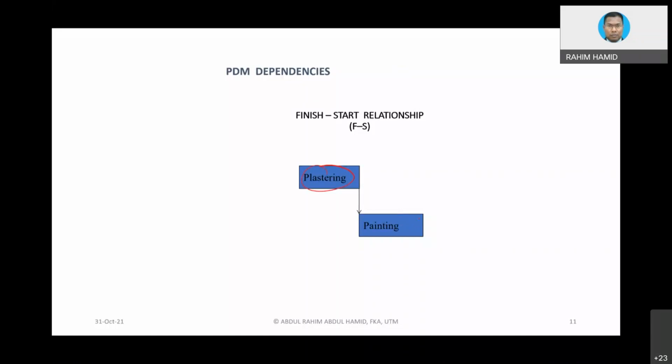But if, for instance, you have a big wall, the entire long span of the building there, why do you have to wait for the entire plastering to be completed, isn't it? You can basically start painting much earlier. This is what we call overlap. So you do the painting on the side which has already dried out, the very far end, or the one where you started plastering, not on the same spot. Anyway, you cannot do that. This is the concept. Okay.